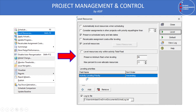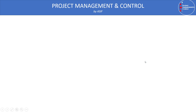You also need to assign leveling priority. Activity leveling priority means the software will level activities with lower priority first, so there is less impact on the project. If you have shared resources between different projects, you can assign project priority levels and the level resources dialog will level resources based on those priorities. You can also change the log file location as needed.